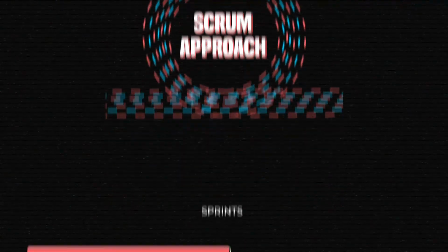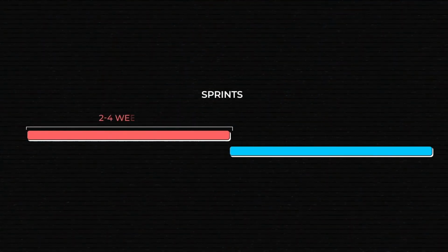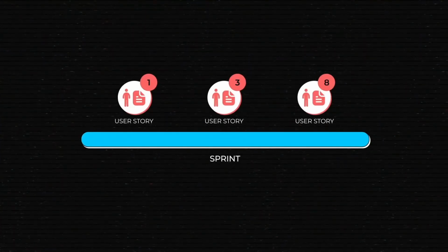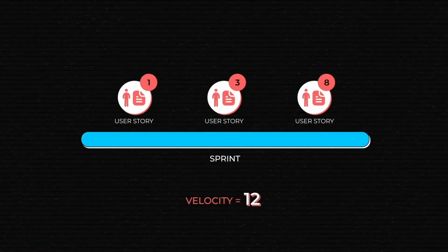In modern development, work is usually done in sprints. Sprints, which initially came from the Scrum development approach, are short periods of time, typically 2 weeks to a month, when a team does a set amount of work. The number of story points the team can complete within a sprint is their estimated velocity. Basically, it describes the team's productivity.